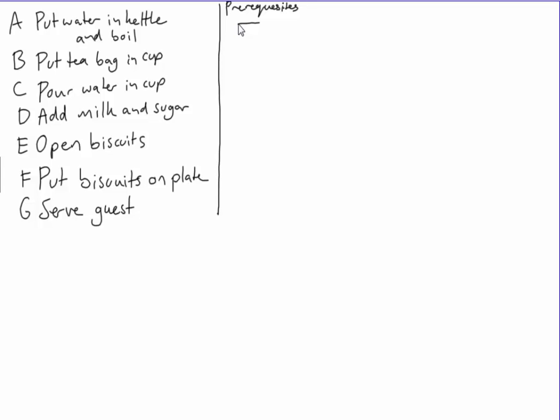Now, step A doesn't have any prerequisites because it is just the first thing we're going to do. Putting the teabag in the cup, that doesn't have any prerequisites either. Pouring water in the cup, now putting the water in the cup, normally you would put it on top of the teabag, so the teabag's got to be in the cup, and you've got to have boiled the kettle. So A and B would both be prerequisites for pouring the water in the cup.